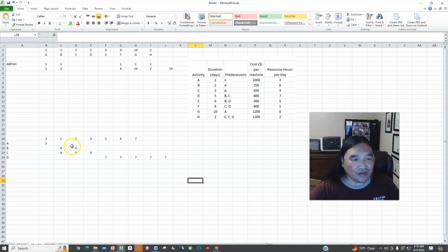As you can also see, we have some slack here, right? So what if it says we don't want you to use more than 8 hours in a day? Well, you have some options here of moving these hours of B around to try to get it all under 8 hours. Actually, you can make it 4, 4, 4.